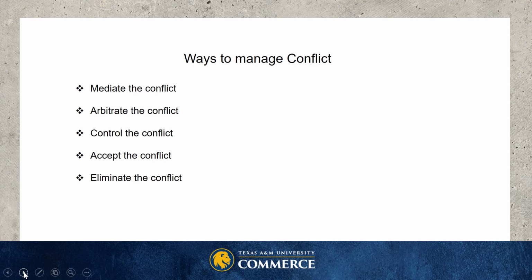Diffusion implies that the project manager is more interested in the solution than he is in what caused the problem. So that takes the focus of blame off either party. Confrontation, on the other hand, is trying to get to the source of the problem, and that takes a lot more time and energy. So if he or she can diffuse the situation, then that's the better course.